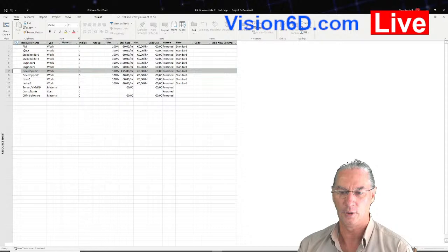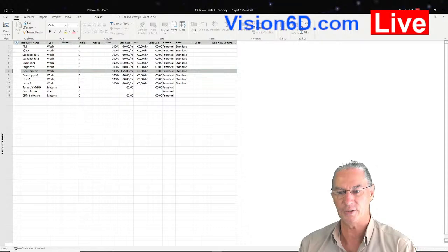For a first approach, I usually try to say to people, look, try to work with 3 levels. Let's make it simple, say 50, 100 and 150. You have people with no specialization, for example at 50. You have specialized people, like developers and engineers, for example with 75 or 100.